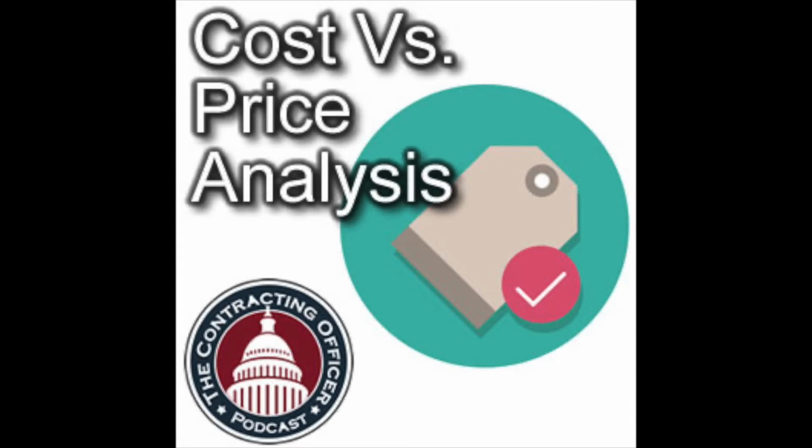Let me make sure that we've set a baseline for what we're talking about here. There's a difference between price analysis and cost analysis, and the FAR lays this out. Same part, 15.404-1(a). You just read paragraph 1. It goes on. The difference between price analysis and cost analysis is spelled out right here. It says price analysis shall be used when certified cost and pricing data are not required, and we've talked about certified cost and pricing data in other episodes.